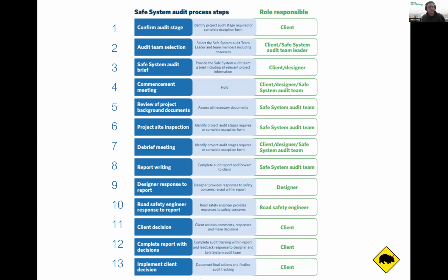On the template, there is a field where the designer fills in their response. So they might say, yes, we recognize this is an issue, but we did it this way because of certain reasons. Or yes, we recognize an issue and we recommend to the client that we change the design for this reason. So that's really the designer's opportunity to have a look at the issue and say what they think should happen to the design.